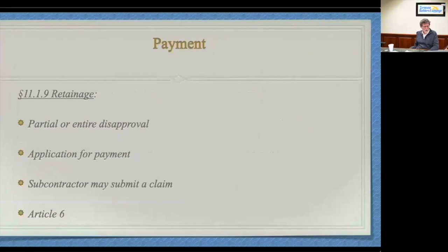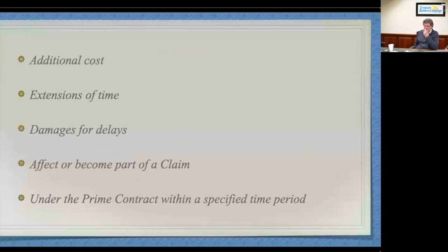for claims. Before I do this payment, keep in mind that there's a thing out there that's called a liquidation agreement. Now that's not in this handout, so you won't find it there. Liquidation agreements are things that when I represent a general contractor, I love. And when I represent a subcontractor, I hate, okay? A liquidation agreement is a contract of its own, an agreement, whereby the subcontractor agrees that its claim is the responsibility of the owner and that it will only recover for its claim to the extent that the GC recovers from the owner, if and when. There's a lot more to it, but that's kind of a nutshell about what these things are.